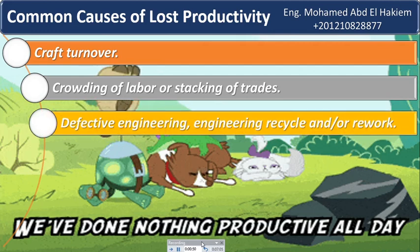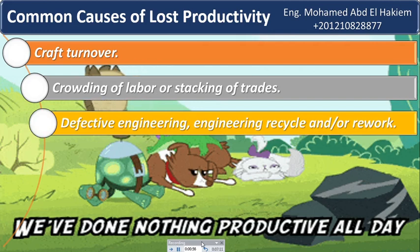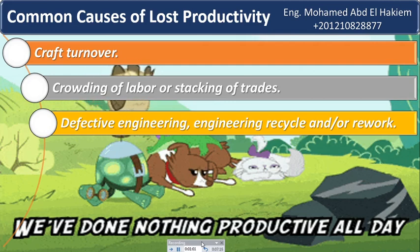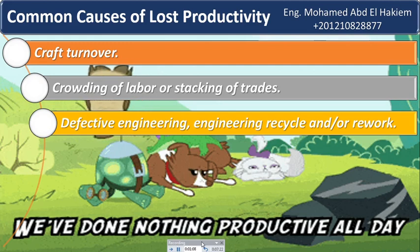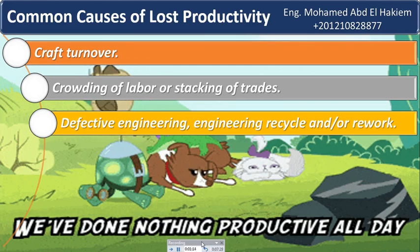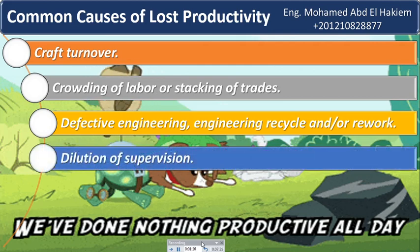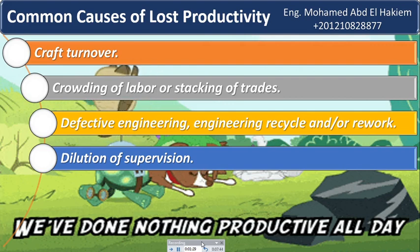Nine: defective engineering, engineering recycle, and/or rework. When drawings or specifications are erroneous, ambiguous, or unclear, productivity is likely to decline because crews are uncertain as to what needs to be done. Crews may slow down, pace their work, or stop altogether while waiting for clear instruction. Ten: dilution of supervision. When crews are split up to perform base scope work and changed work in multiple locations, field supervision is often unable to effectively perform their primary task of ensuring crews work productively.